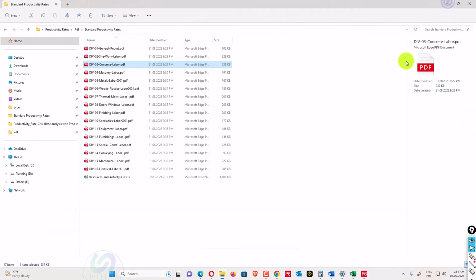So you can calculate that on your resource loading sheet. That sheet is also called a resource loading sheet. You can calculate budget units that way, from quantity divided by your productivity rate, or quantity multiplied by your productivity rate. If there is a crew, you will divide by your crew size, and then you will do that. So I will go here and finalize.